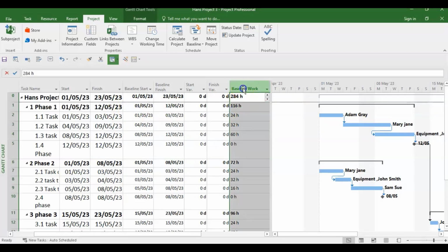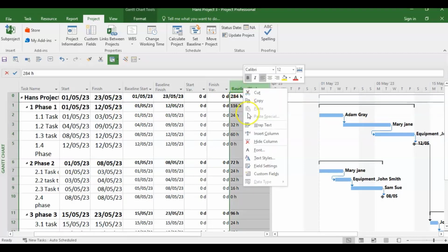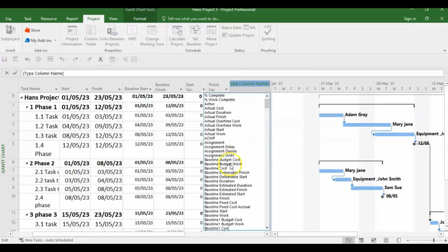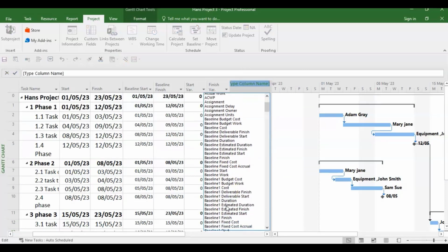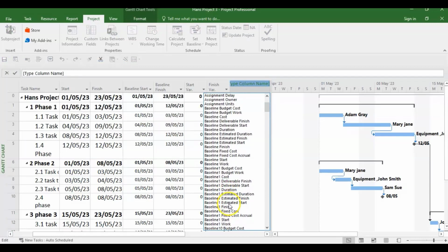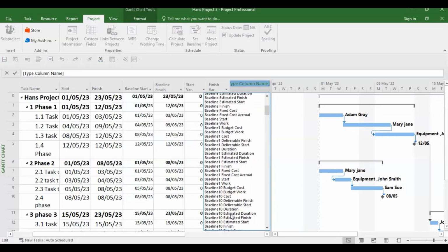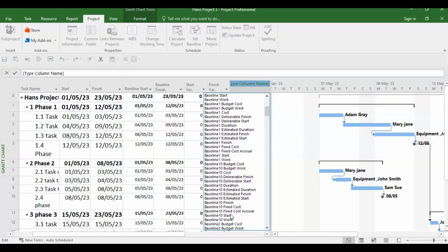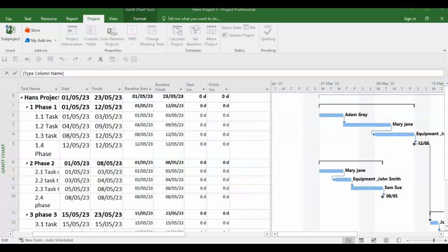So these are some of the fields that you get when you actually establish the baseline. And some are more important to us right now than others, so you can actually go through and get all the baseline information that would have been put there as a result of setting the baseline. Remembering, of course, that any deviation from the baselines would show up in the variance column.